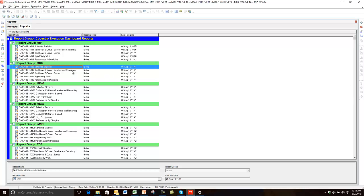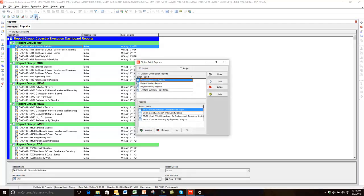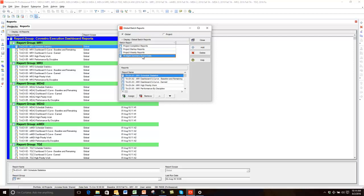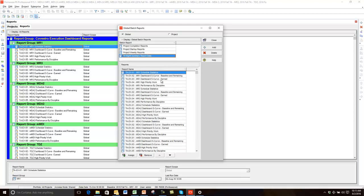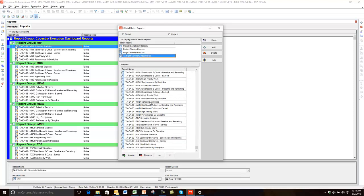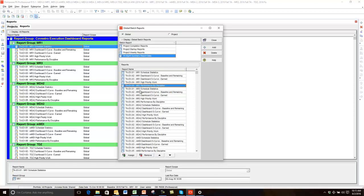The setup can take a little bit of time, but the end result is well worth it. Now once all the reports were built, I came in and set up a batch. I'll click on my batch button here, or you can go to the tools menu to get into that. I created a batch report called TA Management Summary Report Data. If you look at how many reports I've dropped in here, there are five reports and seven units — so there are 35 reports in this batch. Also be aware that when I named the reports, the only thing I changed were the unit IDs or project IDs, leaving all other text identical, with the same numbering convention at the beginning. This made it easier when building the macro in Excel.